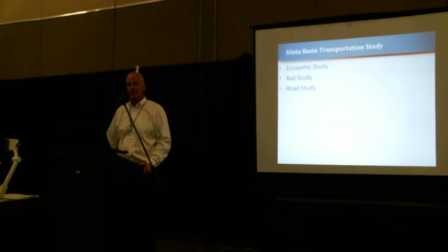But I think the real savings came in, we didn't spend another 3 or 4 years spending a lot of money, getting a lot of commitment, buy-in on the process, the idea of train service in and out of the basin. We were able to determine right away what that cost was. When that cost was presented to leaders in the basin and at the state, political leaders, and they understood that now a train to come in and out of the basin was going to cost $5 billion, it changed their mind about the value of that train. Now, nobody knew that going in, but because we utilized our tools, our technologies, we were able to quickly say, probably not the right time for a train.